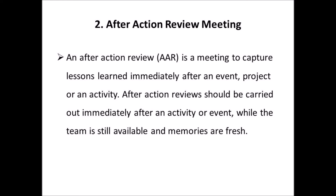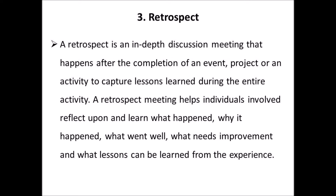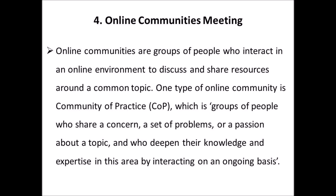After Action Reviews should be carried out immediately after an activity or event, while the team is still available and memories are fresh. 3. Retrospect: A retrospect is an in-depth discussion meeting that happens after the completion of an event, project or an activity to capture lessons learned during the entire activity. A retrospect meeting helps individuals reflect upon and learn what happened, why it happened, what went well, what needs improvement, and what lessons can be learned from the experience.